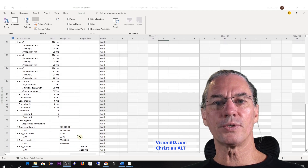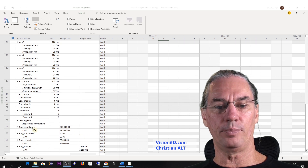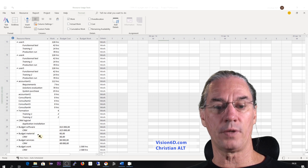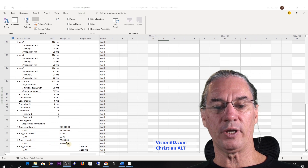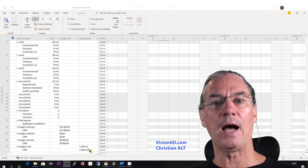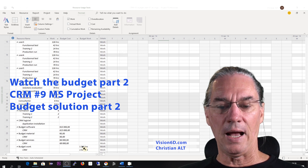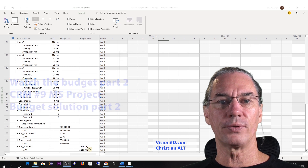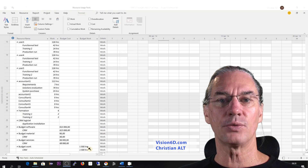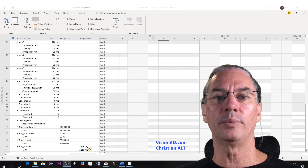In the resource usage view, we can see the detail of the budget: the software at 15,000, the material at zero, the budget for services — mainly training — at 8,000, and a budget of work of 1,500 hours. On this project, we will see in a further video how we can detail those 1,500 hours to get the breakdown per department. This will require that we group and create new resources, so this will be covered in an additional video.